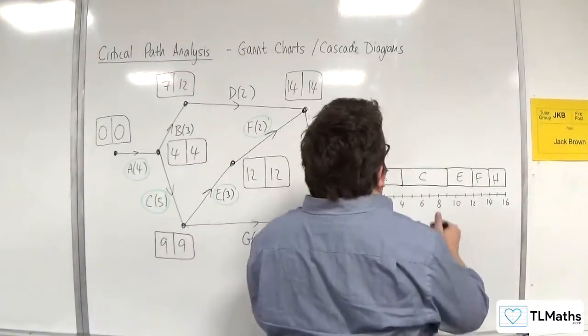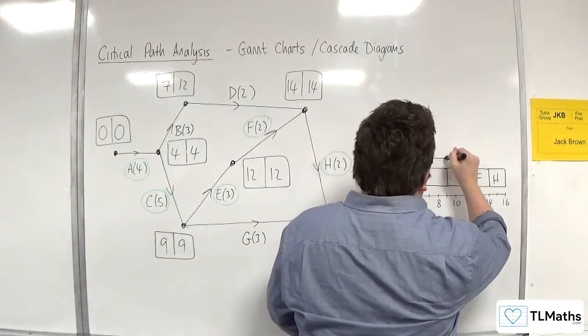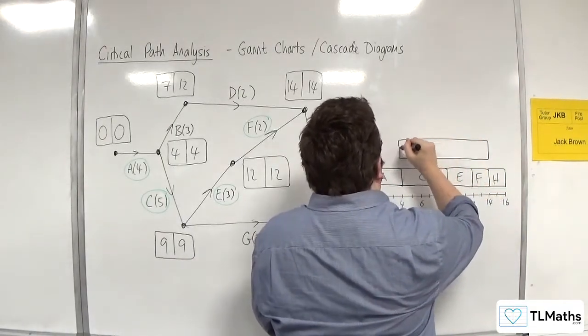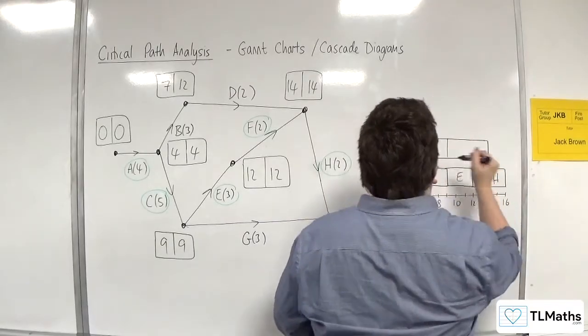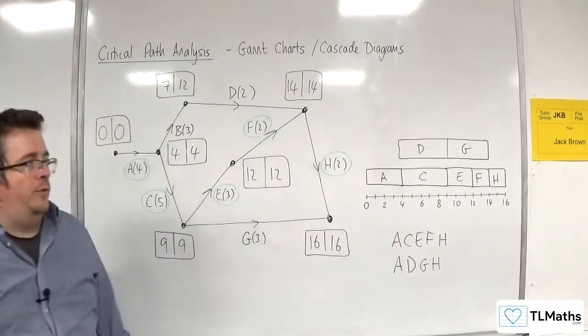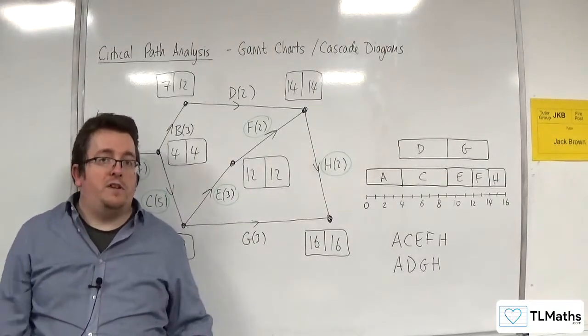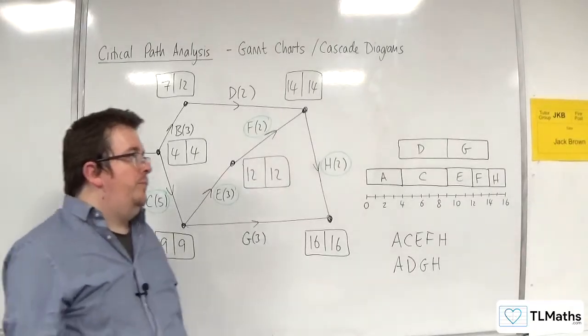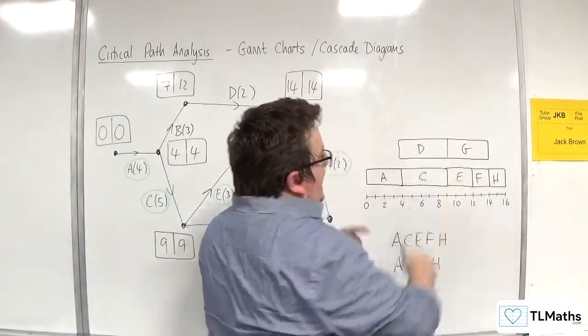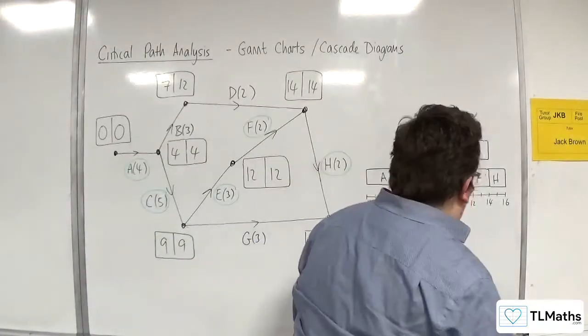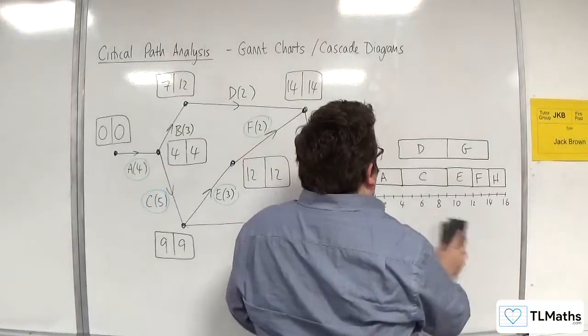So it's representing that D and G are critical because they are together, but you won't redraw A and H. That's how you can represent two critical paths on the same Gantt chart.